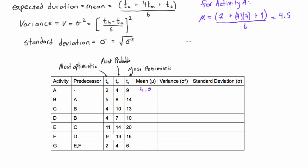All right, then so for variance, we would have, again we can just apply this for activity A, we would have variance is equal to TB minus TA, so we would have 9 minus 2, all divided by 6, and then you want to square that whole thing, and if you do that, if you punch it in your calculator, you will find that we are going to get a variance of 1.36. Now you will need this variance for later problems to do with PERT, so just keep it around for now. You always want to calculate that, so we have 1.36.